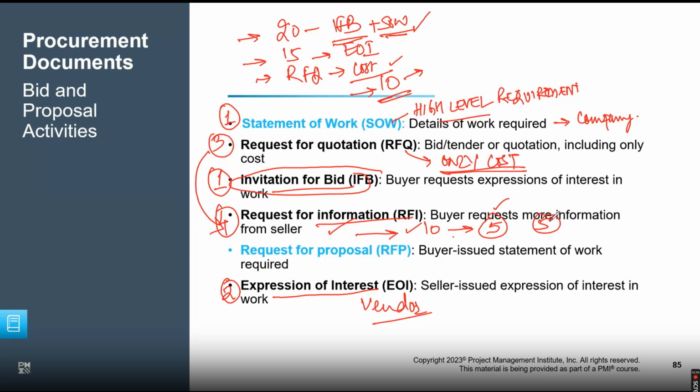Why were they bad? Two have never done a job in our kind of industry. One had a bad experience with a previous project that failed because some issues or dispute happened, so the company declined it. And two were only recently started, so they don't have experience. So 5 vendors have qualified our criteria.